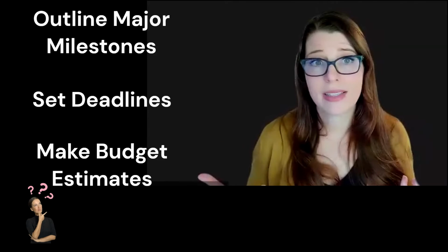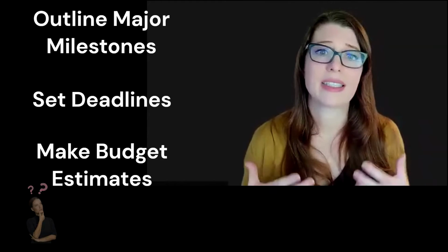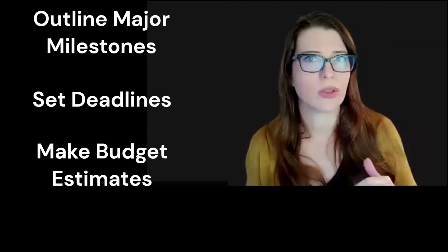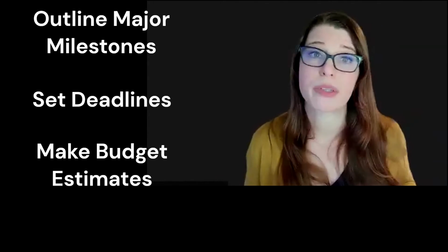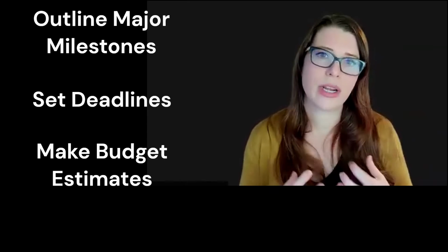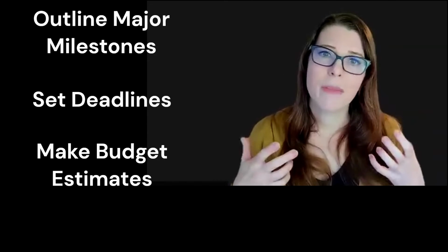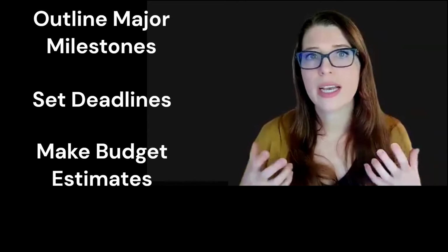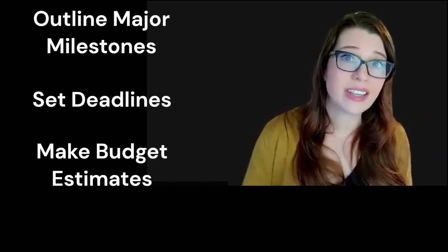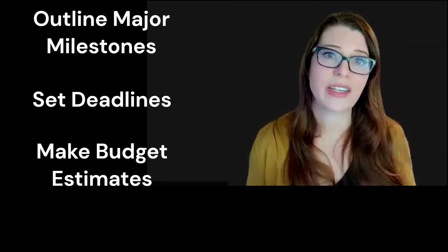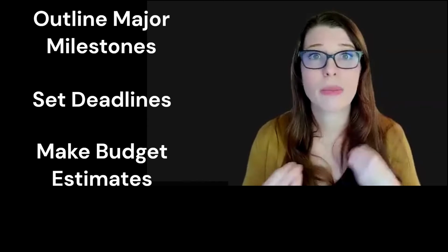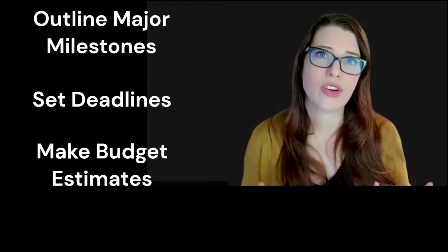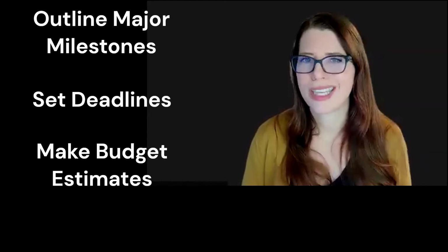So we make a best guess estimate, and that can be easily done with known expenses like materials, software licenses, travel. Are you going to compensate people who are participating in it? All of that you can write down and get fairly good estimates. But then you'll just want to use your best assessments about other types of resources. And don't forget to write them down. Make sure you're writing down the skills that you're going to need to have on the project, people's times, different opportunities for collaborating. Just like a schedule, build everything out and try to plan for a little bit of extra room when things go wrong.